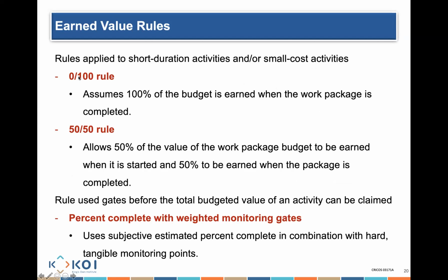Yes. Okay, I was talking about these rules: 0-100, 50-50, and the percentage complete with weighted monitoring gates. That's the percentages. You might say day 1, 30%, day 2, another 30%. So you put a percentage of the work that is completed at any point in time.